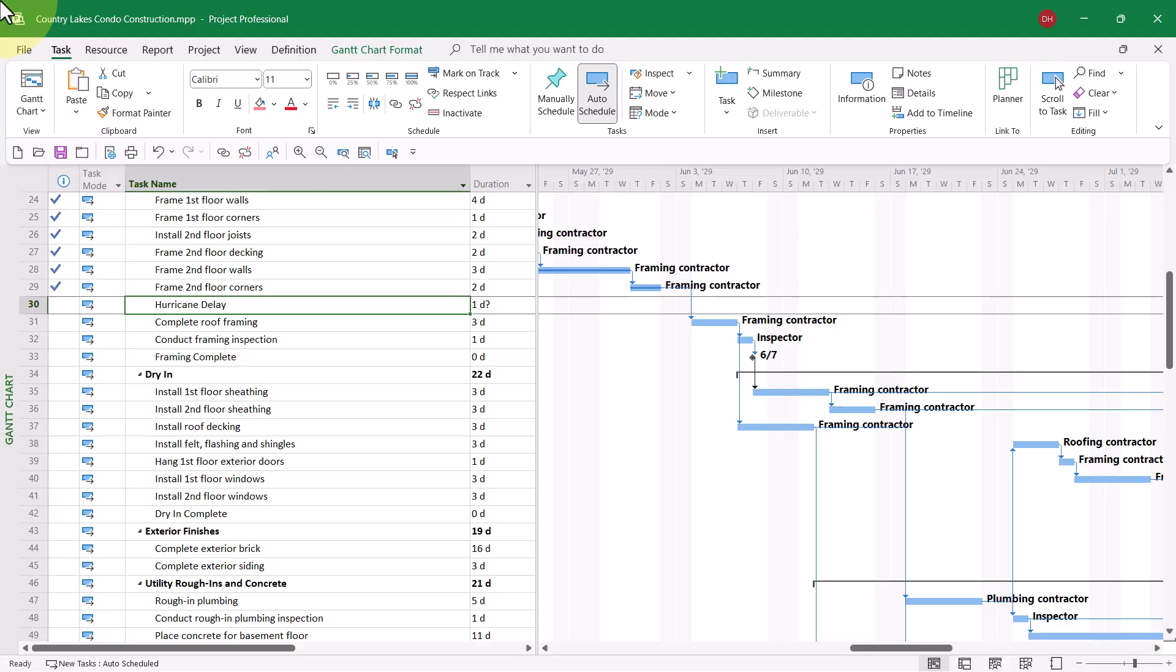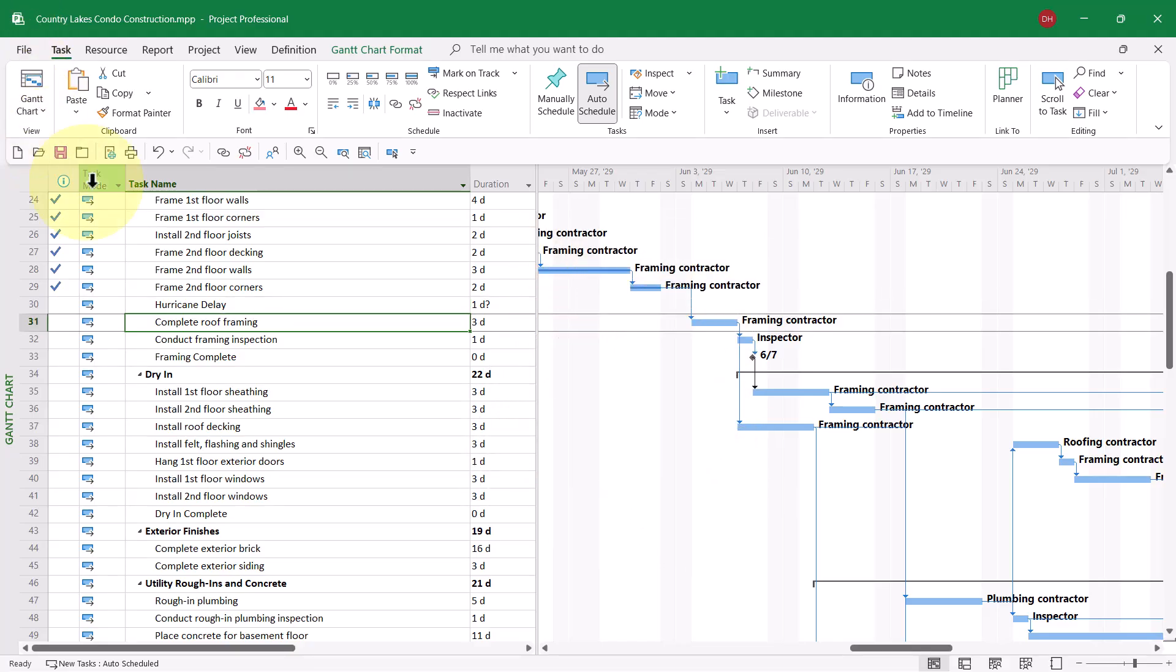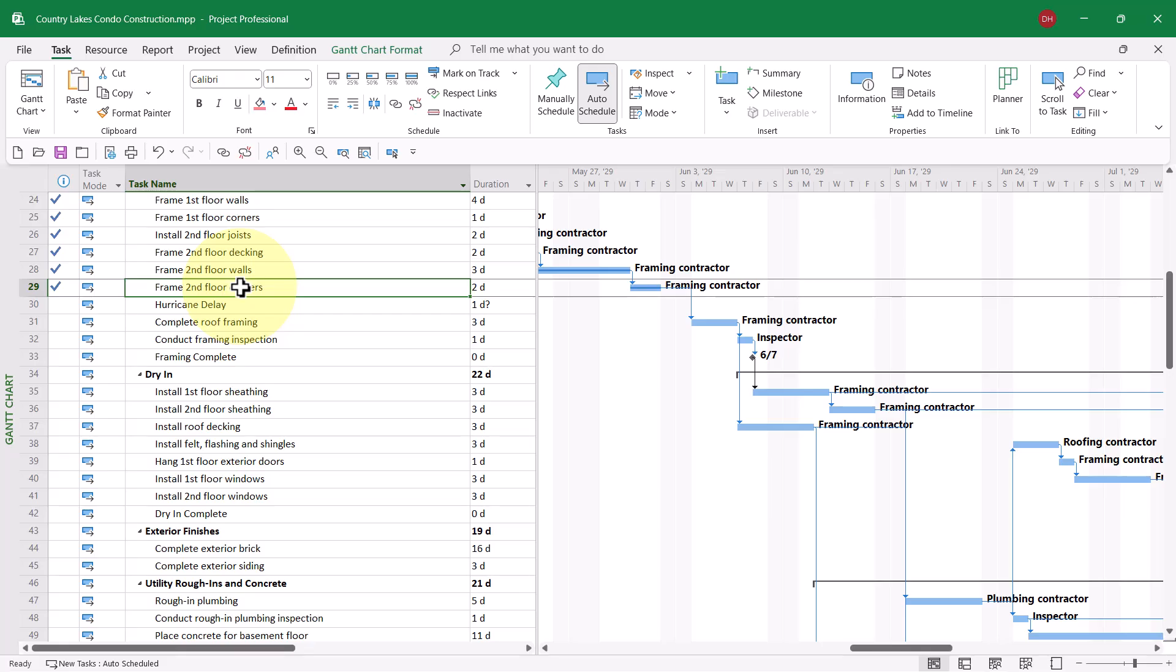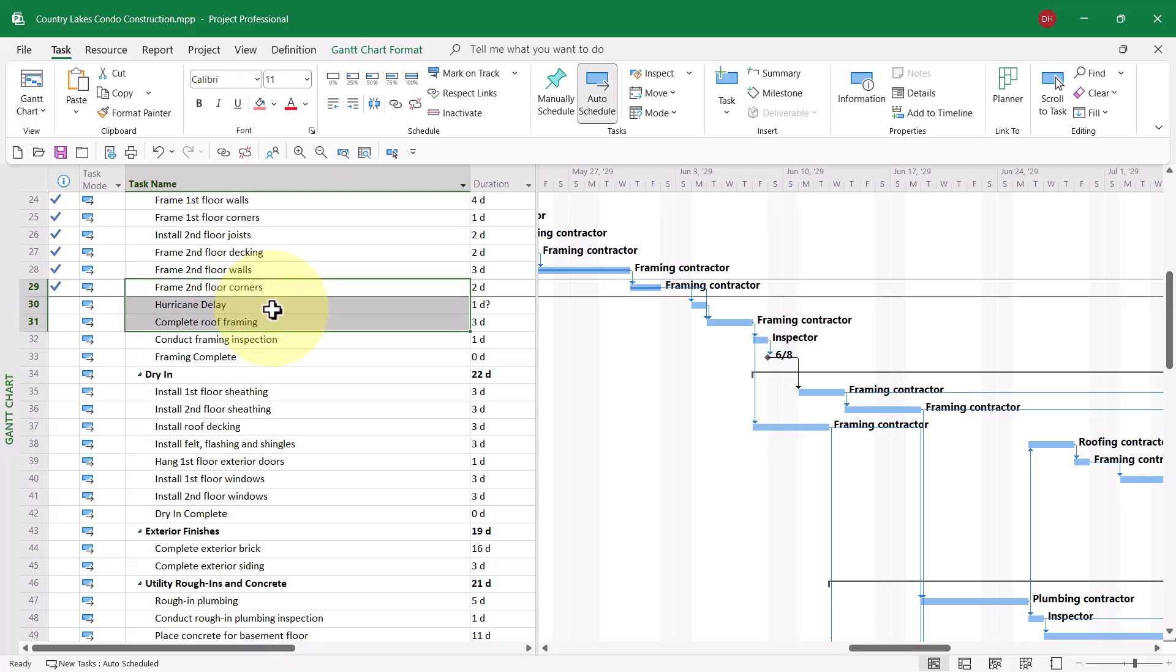Next, I would select the task before the hurricane delay, down through the task after the hurricane delay, and then link those tasks with a Finish to Start dependency. Now, here comes the first challenge.